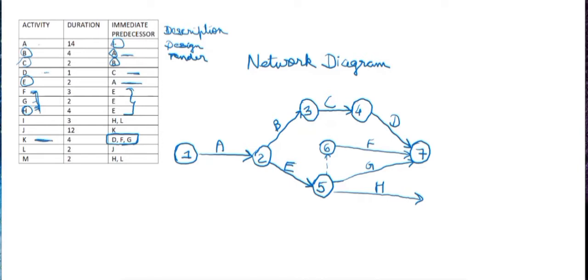Then as we already know that our next activity is activity K for which the immediate predecessor activities are D, F, and G, and all the three activities meet at the node 7. So this is how we can draw our next activity which is activity K.